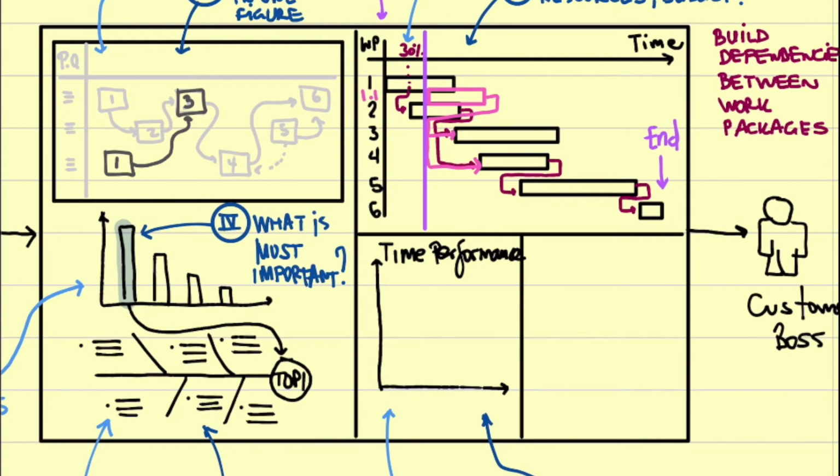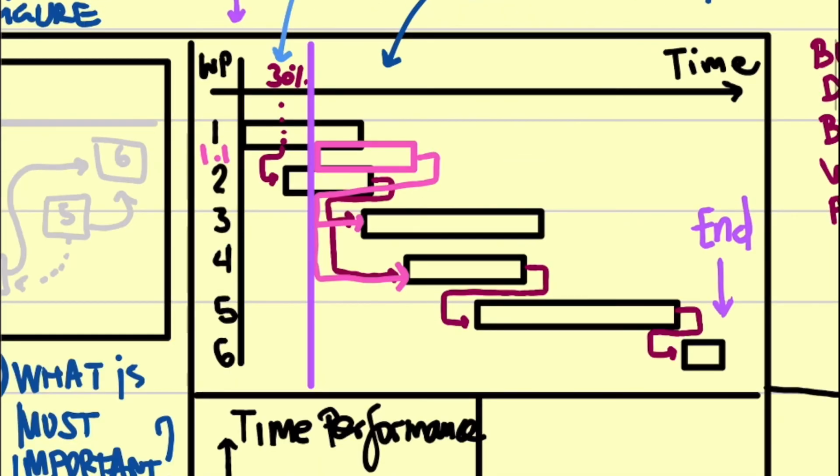What we do is we make a so-called back spike. Here we are delayed, let's say by 2 weeks. And here we are delayed by 1 week. Okay?